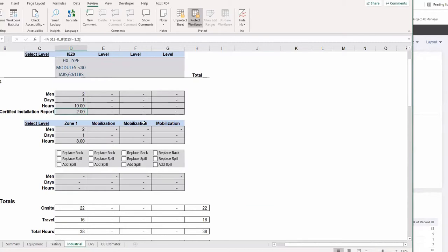So to talk about the hours, and this is outside of now our East team, we have always quoted a day rate. If something takes us 1 hour or 2 hours, as NPG at least, we always quoted a day rate. The decision was made to continue doing that by our now Exponential Power, with the exception of data center and telecom.